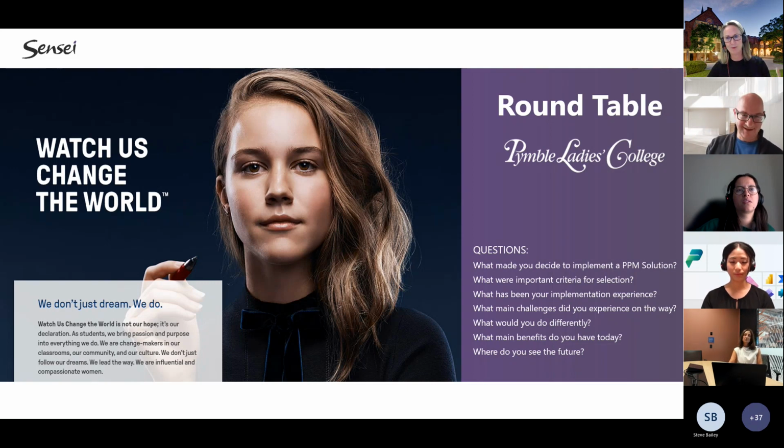We have repeatability. In one of my last positions, I was in charge of the operational side of service learning, community service, and our international exchange program. Those are key programs which could all be absolutely documented, templated, and scheduled. And guess what? Reuse, recycle every single year, and that's the power of the scheduling tools, and that's the opportunity that we have across our campus.